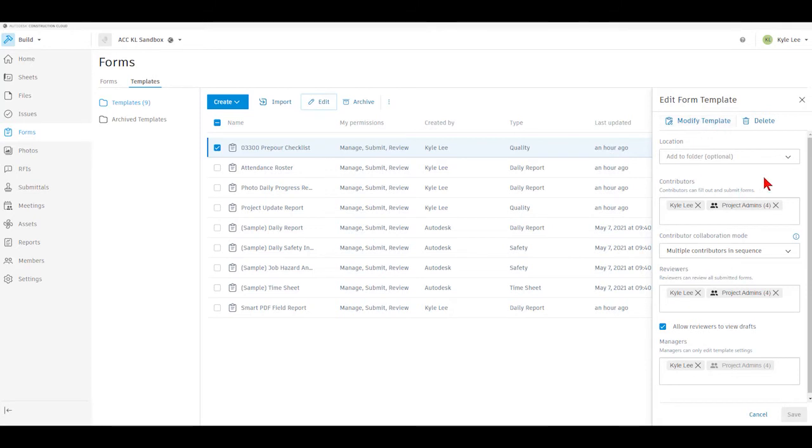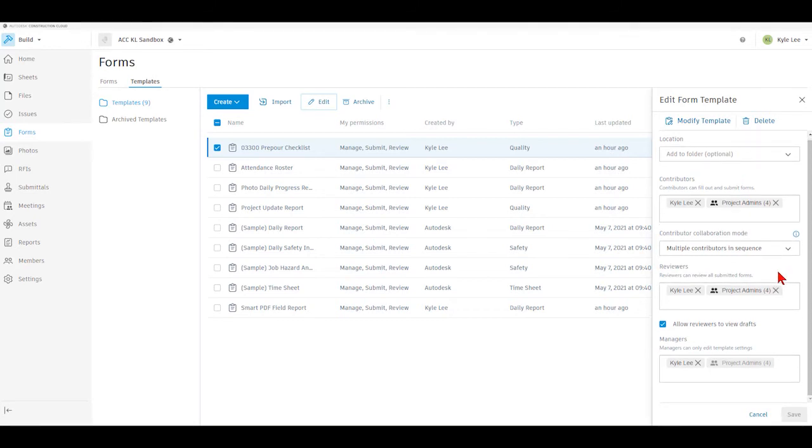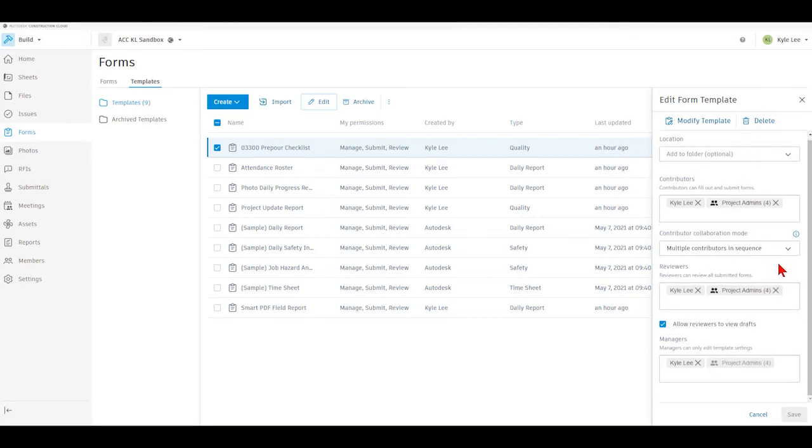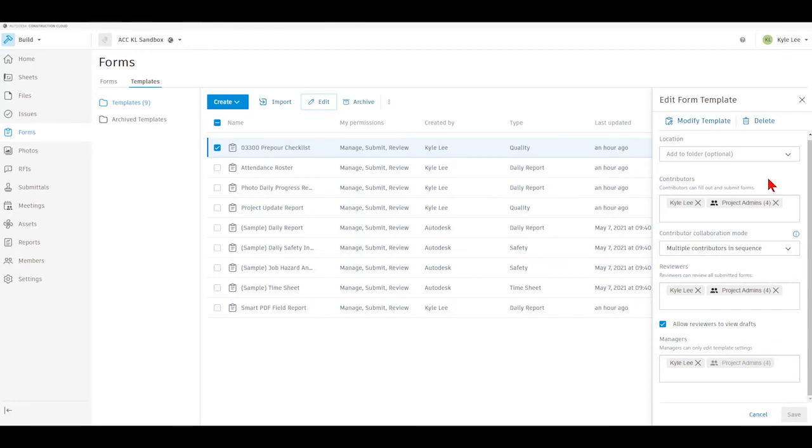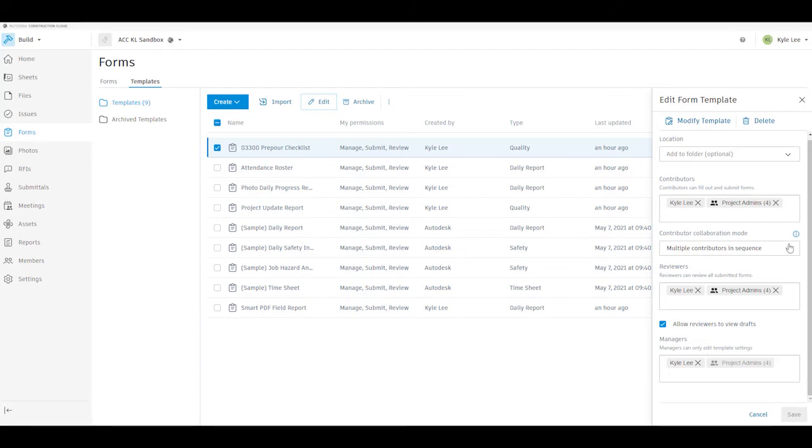The other thing that we can do here and what's most important is we'll want to make sure that we can set up our contributors. We have three different levels of participants in the forms process here. We have contributors - those are the people that can actually complete and submit the checklist or punch list forms. We have reviewers - those are the individuals that have the ability to go in and view any of the submitted forms. And then we have managers - the managers can only edit your template settings. So the first thing we want to make sure of is that we've got the individuals on the project named as contributors that are going to actually be completing these templates out in the field.